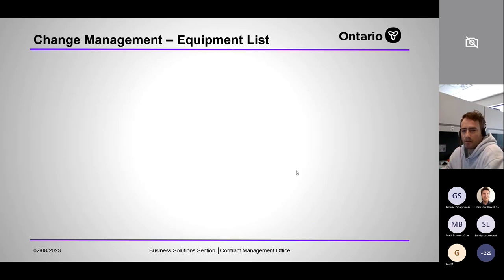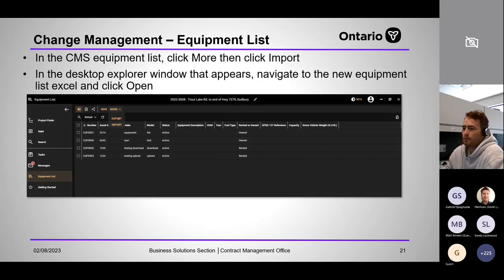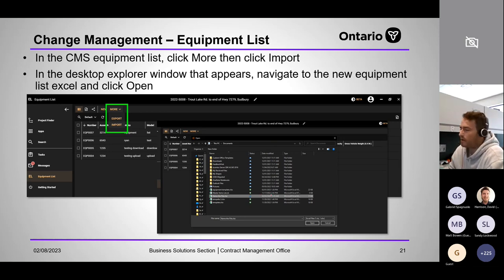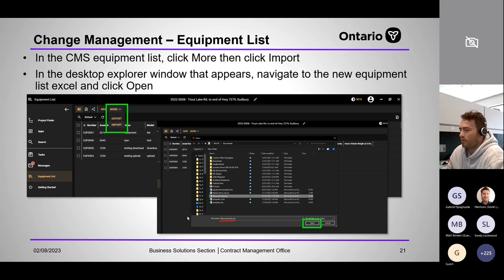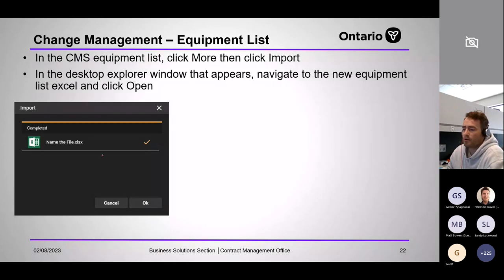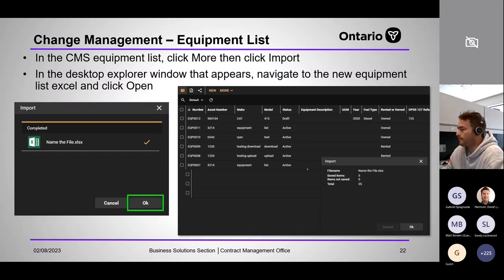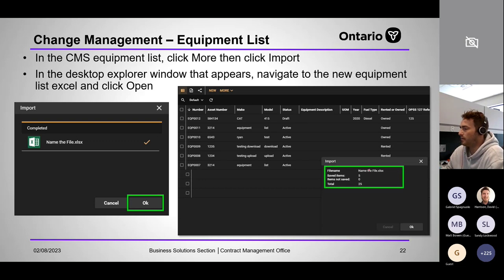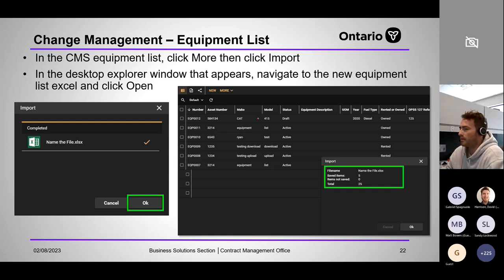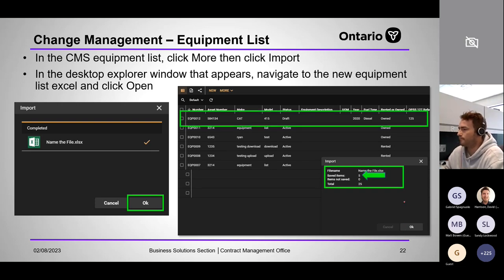You should attach an invoice to the daily work record if you can. If you don't know the material or invoice at the time of the DWR, you'll have the opportunity to add it again in the TMSP — just add singular entries, type in the material, attach an invoice, and if the CA agrees it'll be paid. Here's the material list; you can see the DSM number list and reference things right in there or add your own external link.